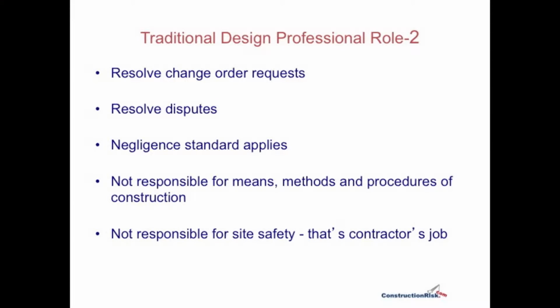The designer is not responsible for means, methods, procedures of construction. That's what the contractor takes on as its responsibility. Nor is the designer responsible for site safety. Again, that's typically the contractor's role.